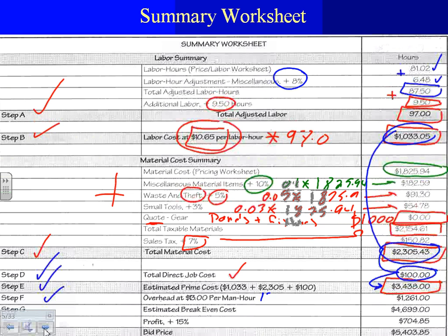So here's my 13. Multiply this by $13. Multiplied by how many hours? Remember the hours for the whole project, 97 hours, and that's where they came up with this number. Okay, everybody see, guys, where they came up with this $13 multiplied by 97 hours. They came up with this 1,200. So it will cost me to manage this project. Overhead for this project, managing the labor, mainly managing labor, it will cost me $1,200.